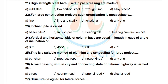Question 21: High strength steel parts used in pre-stressing are made of. Options: mild steel, low carbon steel, wrought iron, alloy steel. Correct answer is alloy steel. Question 22: For large construction projects, which organization is most suitable? Options: line and staff, functional, anyone. Correct answer is line and staff.